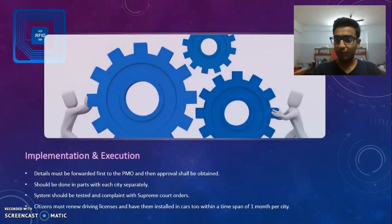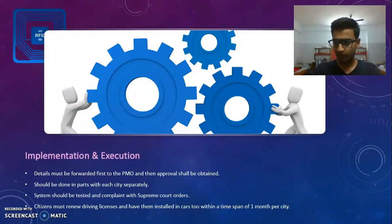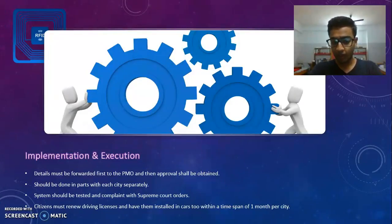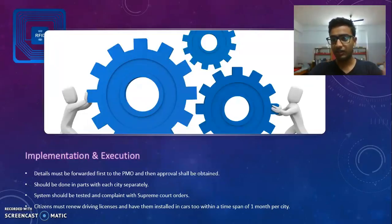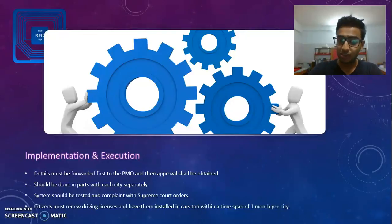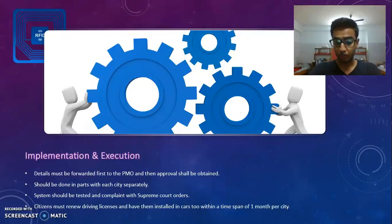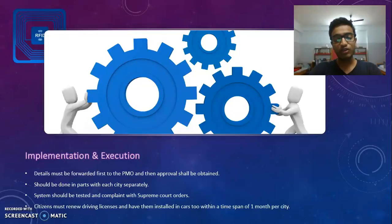Now comes how I plan to implement and execute it. Firstly, the details must be forwarded to the PMO and approval obtained. Next, it should be done in parts, with each city included separately, so that many parts working together make one complex system. The system should be tested and compliant with Supreme Court orders, and citizens must renew driving licenses and have them installed in cars within a time span of one month per city.